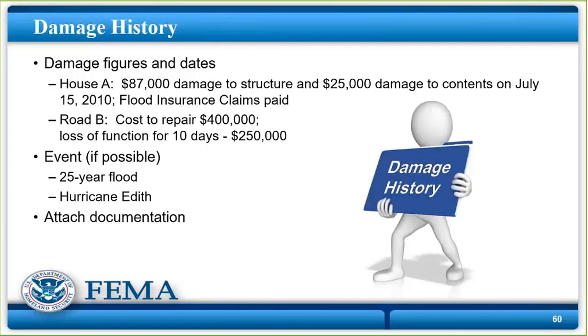And a lot of times, I will say almost always, in presidential disaster declarations, the community has applied for public assistance to fix the damaged roads and bridges and buildings and the like. So there is a public assistance worksheet that identifies the damages. You can reference those. We don't have them here on our site, so you have to tell us what they were. Just because we're FEMA, please know there's a huge silo between us and the public assistance disaster program.